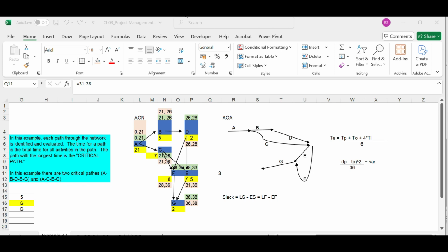To account for the delays and risks in merging multiple predecessors, we can add milestones and we can add a feeding buffer to manage multiple predecessors. In project management, feeding buffer protects the critical chain from delays or disruption caused by non-critical chain. It is a time reserve placed between the end of a non-critical chain and the start of a critical chain task, allowing for variability in non-critical chain without impacting the critical path's timeline.